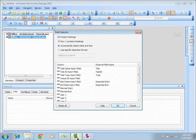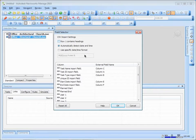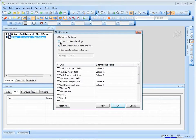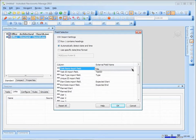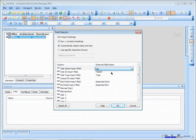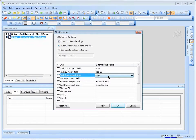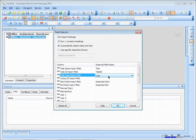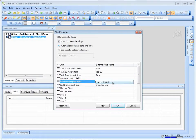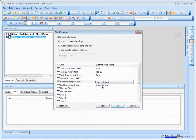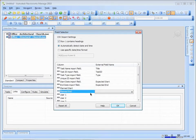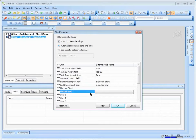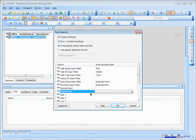Okay. It's turned on right now with row one contains the headings. Okay. If that was turned off, instead it would just be column A, column B, column C, but I'll say the first row actually contains some headings. And then for each of the different items, we can just sort of say what the mapping is. The task name, I called title. Task ID, I actually have something called task ID without the space. Type. Type is the issue. Is it a construction activity or a demolition activity or a temporary activity? I don't have a unique ID. I have a start date, which maps to my column expected start. And I have an end date, which maps to my column expected end. But all that really is, is just mapping things apart. And you can even add in some more fields. There's like 10 user defined fields. You could really bring in whatever's going to help you manage the data as you go through and try and sequence it. So that's enough to get ourselves started.